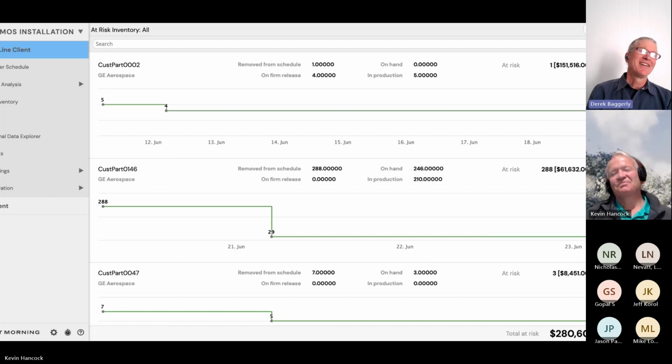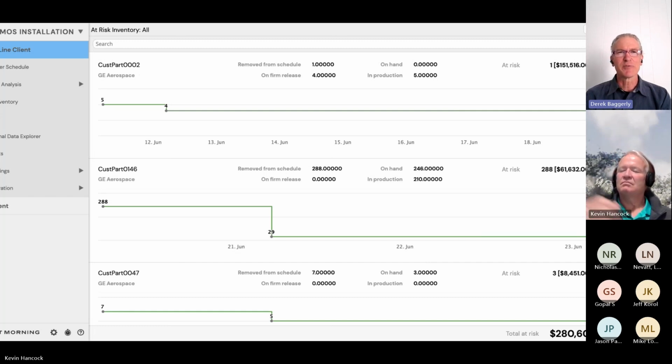All right. So the chart is relatively obvious. It shows what changed, and then it actually has the dollar impact. I'll give you a quick anecdote. We were recently visiting a supplier, and they showed us something that didn't get killed from the schedule, but it got pushed out about 8 months. Like, well, how much was that? Well, about $28,000.